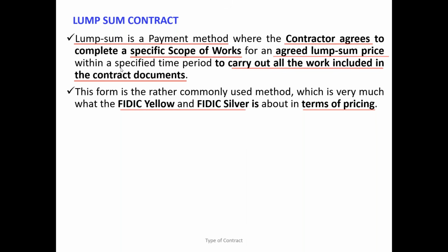No. In other words, if in any project the design or scope of work is not well established, then it is not possible to go for a lump sum contract. That is a very key understanding. You must all have it. So let us have some more discussion.